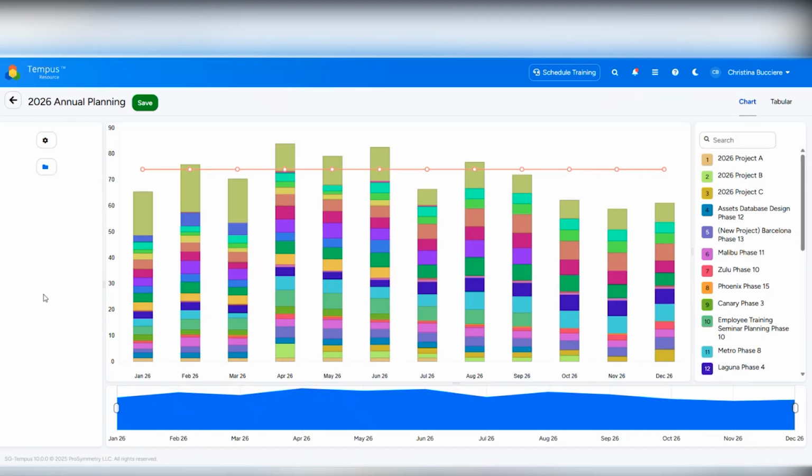So here, what this is showing me is all of my in-flight work, and then the new demand is brought in as well. They're represented by the little colors on the bar charts. This capacity line is representing all of the capacity for all of my teams, and I can clearly see in what months I am exceeding that capacity line by including all of this work, all of the 3 new projects I brought in as well.